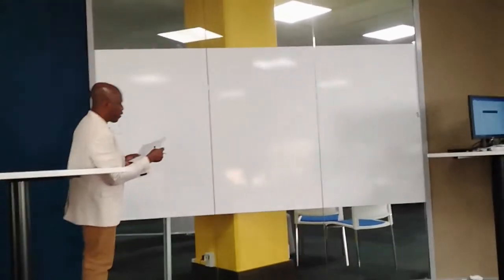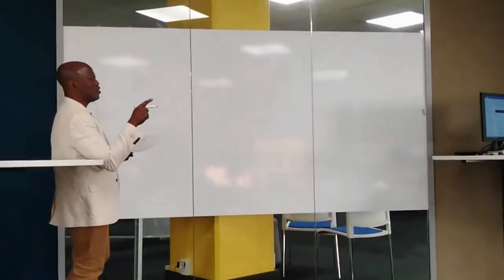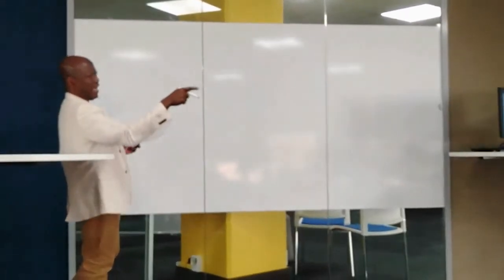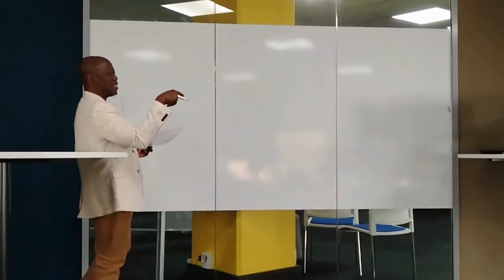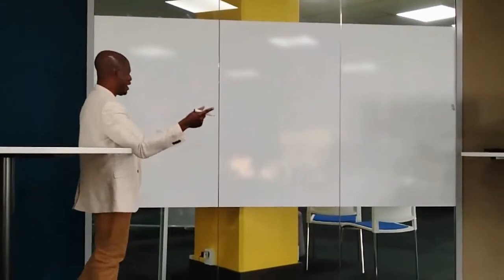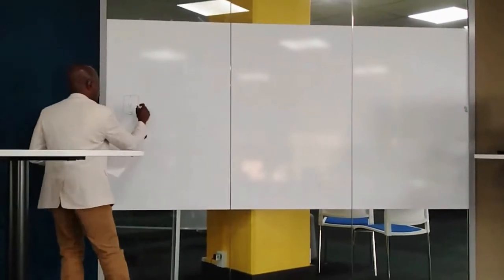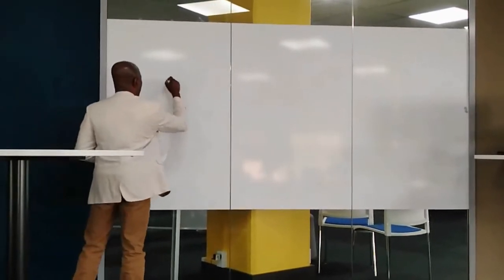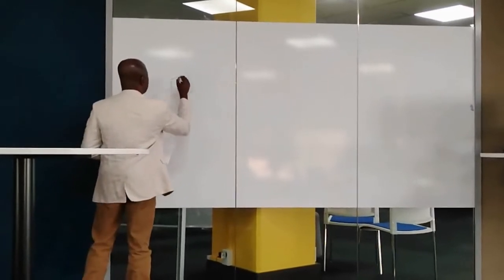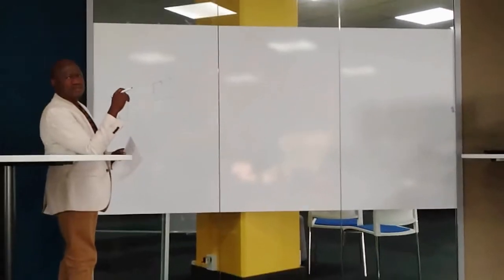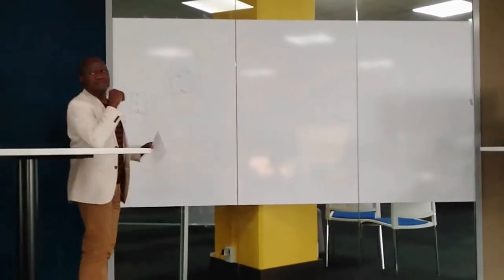Conference topic. We say conference topic is preceded by activity 1, right? Yes. Meaning that activity 1 has to be completed before we do conference topic. So we draw from here, because this is 1, remember? So we go like this. We go to the second one, conference topic. I'm going to name it 2. How many days? 3 days. We put our 3 here.